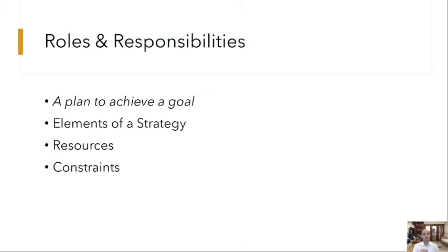So we can say the person who is responsible for executing the action is responsible, and the person who makes sure that the action is executed but does not do it by themselves is an accountable person. It means the managerial level. And then the consultant, the person who optionally takes part in the execution part, we will just consult with them, and inform the person who stays informed about the status of the execution. We call them an informed party.